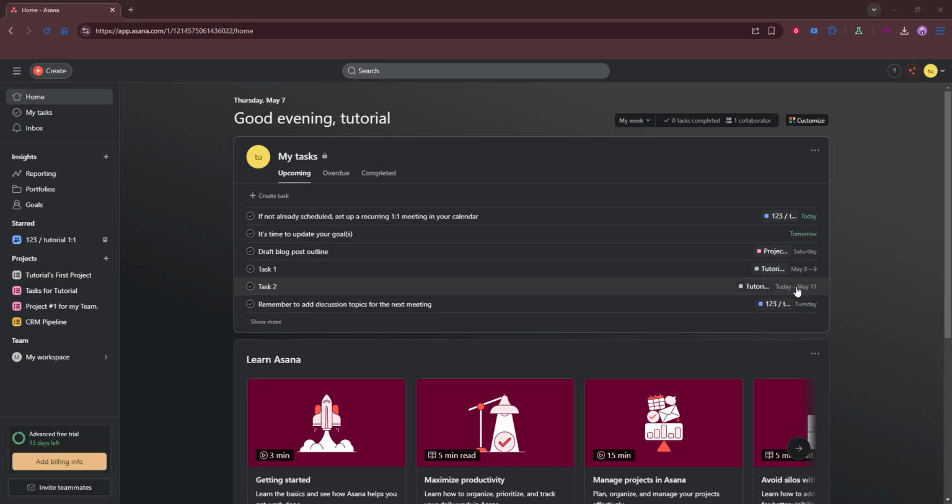We'll begin by creating a dedicated project for your event in your project management tool. Give it a clear, descriptive name so it's easy to find later, and add a short summary that states the event date, purpose, and success criteria. This becomes your single source of truth where all planning, conversations, and files live in one place.